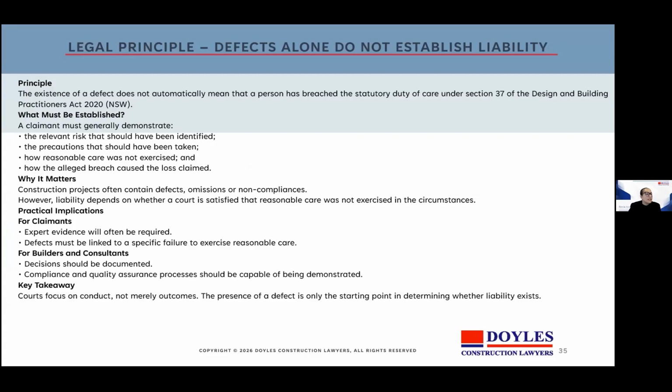Flowing on from the LULAC case, the defect is only the starting point. Liability turns on whether reasonable care was exercised. So courts judge your conduct, not just the outcome. One of the most important messages from LULAC is that a defect report is not the same thing as proof of liability. So again, the courts will examine the existence of the defect and examine whether reasonable care was exercised. This reinforces the importance of documenting decisions, inspections, reviews, and compliance processes throughout the life of the project.